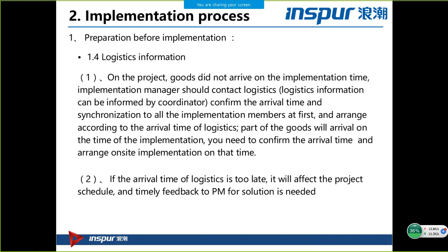And also, you need to go on site on time. You must go on site before the delivery team goes on site. Only in this way can you see what they did for our servers, for our packages in the data center, in the loading dock, from our delivery team.